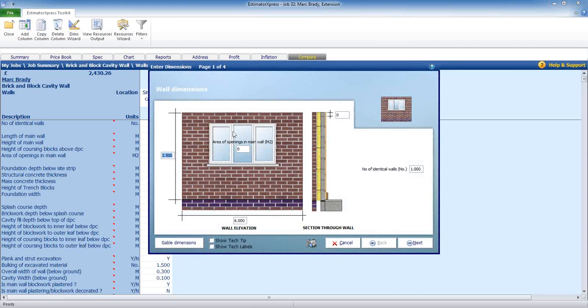So the walls itself, as you can see, is the total brickwork, the brickwork shell. We've got a kick-off dimension there at 2.5 meters, but looking at my set of plans, I can actually see it's 2.4. So I can change that to 2.4 meters. Measuring off the plan again, our first wall is going to be 6 meters. So yeah, quite happy with that.